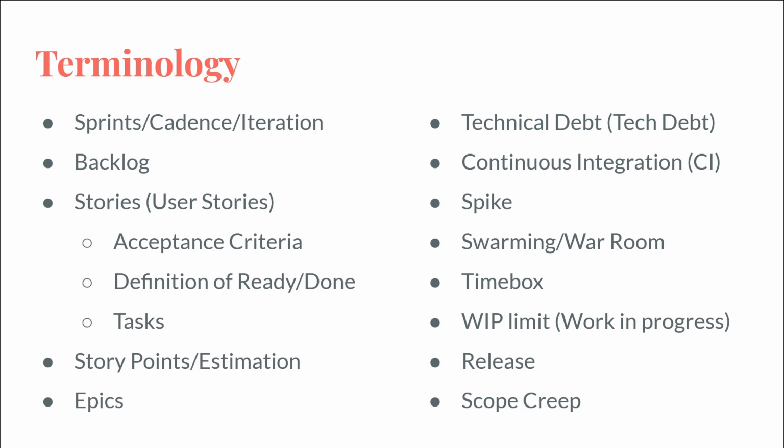The backlog is a list of all of the possible work that can ever be done on this project. So anytime you have an idea for something that can be done, or a bug that needs fixed, you create a ticket or an issue or a story, and that is then stored on the backlog. Occasionally you'll go through and organize the backlog to prioritize stuff, so that the stuff at the top is what gets taken off next, and that's what gets worked on.